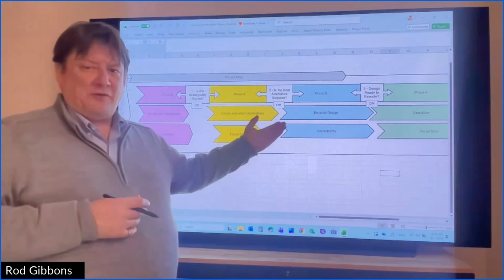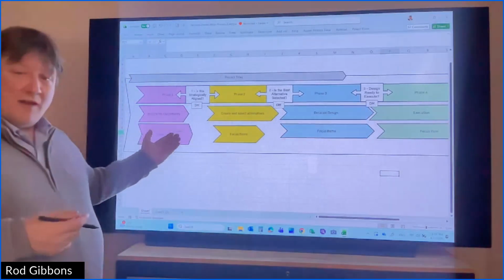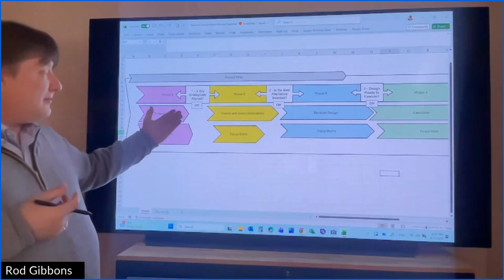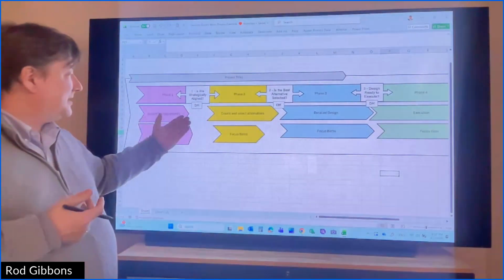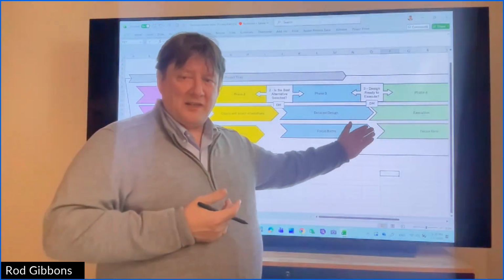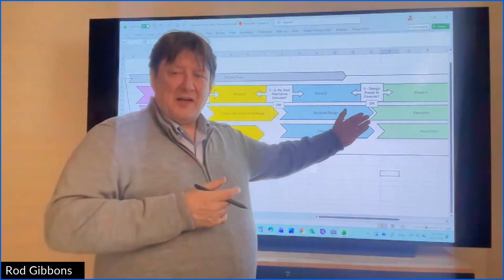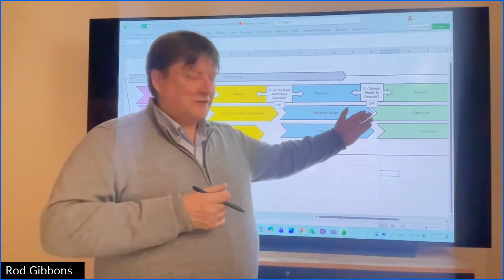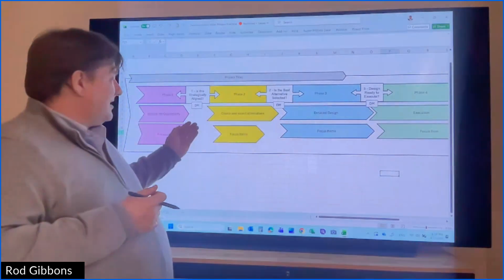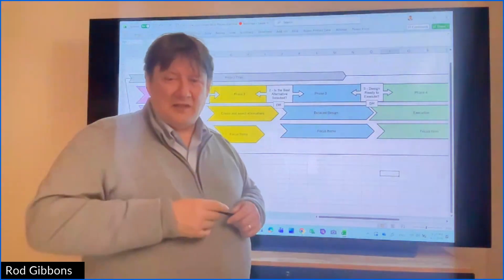I would say this is not a sales job. You're trying to inform the decision maker with the best information that you have at the time. And of course, at phase one, you're going to have limited information, and the decision maker knows that. Typically, cost and time estimates, when you're ready for AFE, are usually plus or minus 10%, the expectation being that you have quotations in from people and a fairly tight estimate on cost and time. After phase two it's probably plus or minus 30%. Phase one, plus or minus 50, plus or minus 100. You have it in the right range, in the right ballpark.